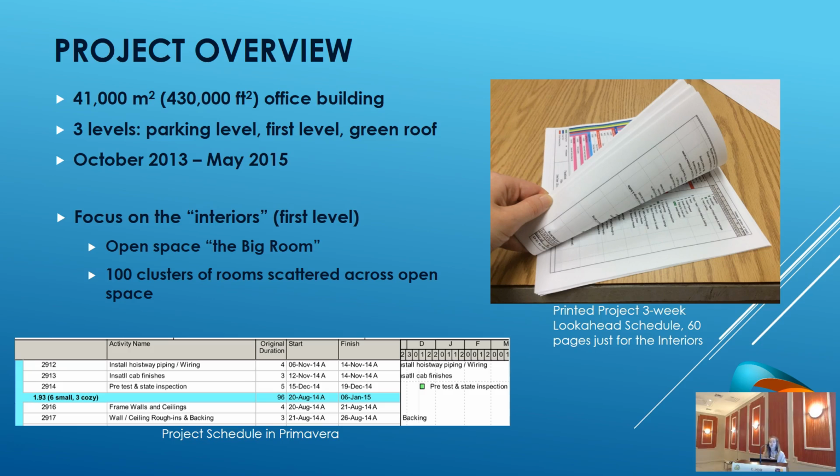The general contractor was generating the schedule in Primavera, so P6. The Primavera schedule included the activity name, the start date, the end date, and the location. What was missing? The subcontractor's name. So in terms of the inputs, that's what we really focused on.